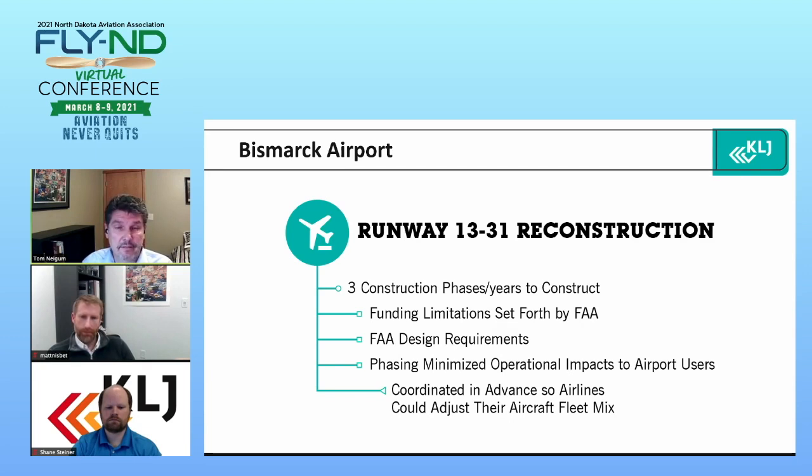I have to give a shout out and kudos to the Bismarck Airport staff, Greg, Tim, and everybody who worked really hard on this with us and kept the airlines well informed. You need to coordinate probably 6 months in advance with airlines on their aircraft fleet mix, so that they're bringing in the appropriate sized aircraft and not something that can't land at the airport. That was really important.